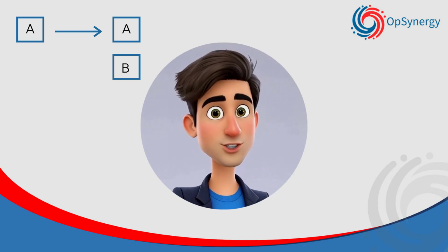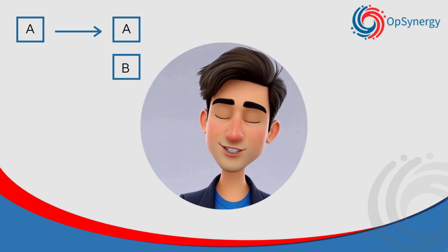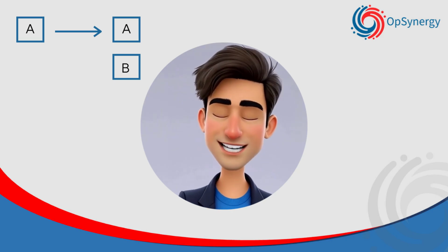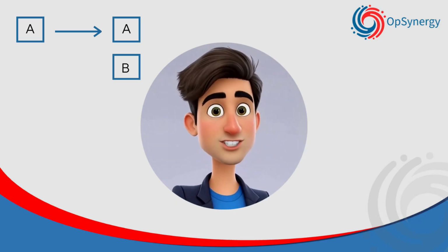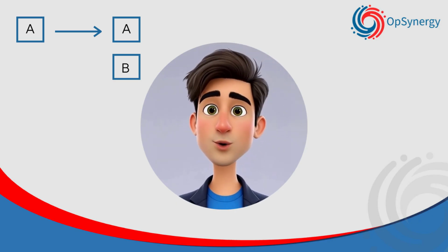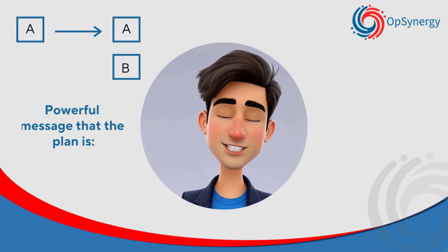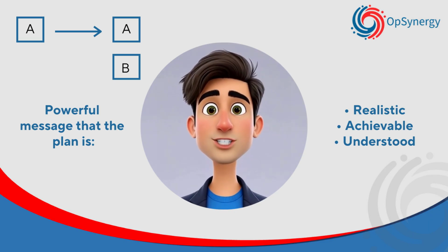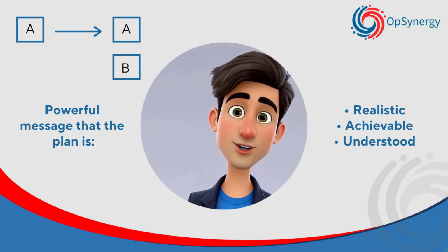So what's the psychological importance of leveling? One of the most overlooked benefits of leveling is what it does psychologically to a team. When people are repeatedly scheduled beyond their capacity, they stop trusting the plan. They assume everything is unrealistic. They start ignoring deadlines. They start cutting corners. They stop escalating risk because they believe nothing will change anyway. When you level resources, you send a powerful message. The plan is realistic. The workload is achievable. Leadership understands human limits. That single shift dramatically improves performance discipline across the project.